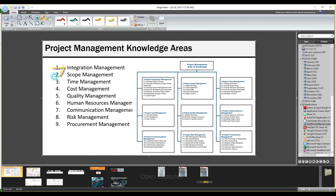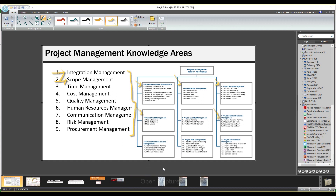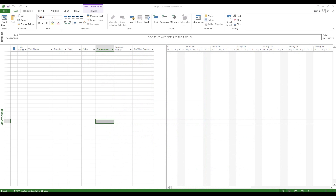So the next time you review a project, you will do it much more efficiently. The typical PMP knowledge areas are: integration, scope, time, cost, quality, human resource, communication management, risk, and procurement. You cannot be an expert in everything — the PM knows everything at a high level but cannot do every task himself. For procurement management, there is a procurement team; your job is procurement forecasting — material ordering, lead times — so materials come in on time between projects.